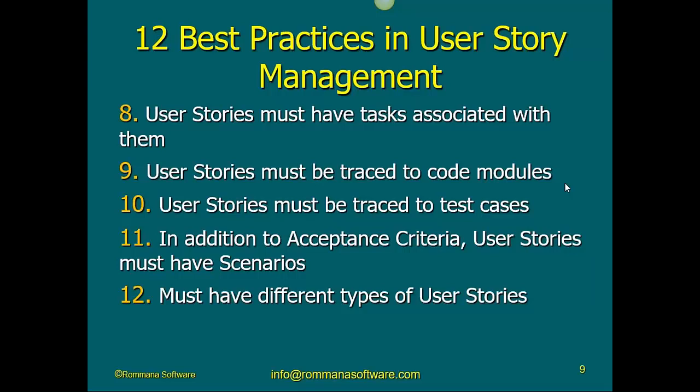It has the task of being reviewed and approved, the task of being designed, the task of being coded, the task of being tested. And even if it is all one person who's going to do it, we need to keep track of those tasks, because we need to keep track of the progress in each one of those tasks. We don't want to just simply say the user story has been completed or not completed. My God, if the user story has so many tasks, can't we say which task has been completed and which not?